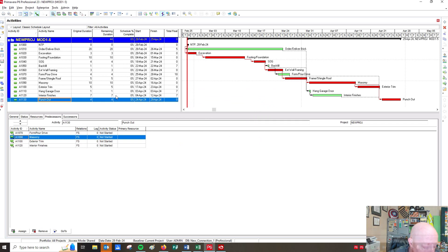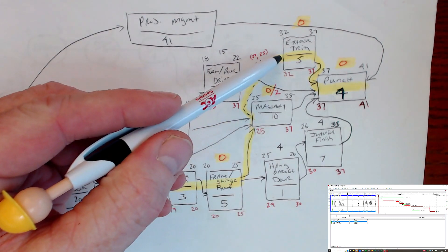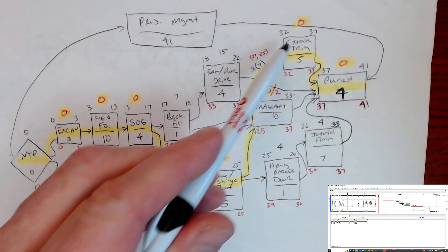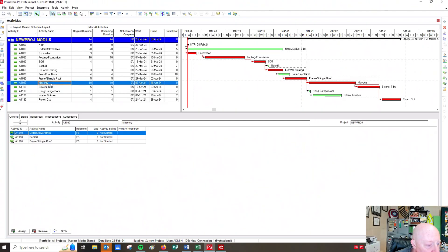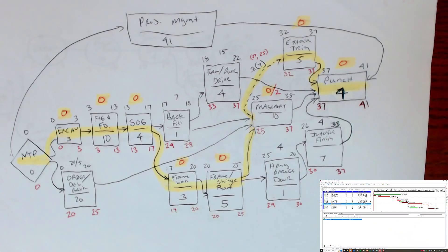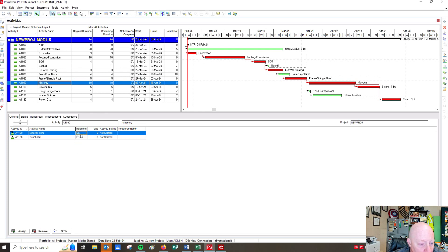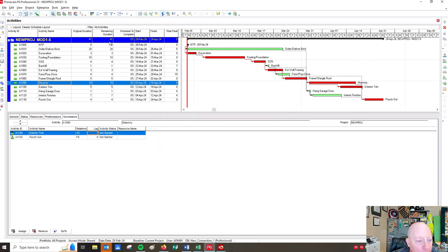The only other problem is probably the start-to-start relationship. Looking at my drawing, I've got a start-to-start coming out of masonry into exterior trim with a seven-day lag. So masonry to exterior trim — let's look at the successors coming out of masonry. I've got punch out but I don't have exterior trim with start-to-start. I'm going to find the exterior trim relationship, change it to start-to-start, and set a seven-day lag. I'll click off on the white part of the screen, then hit schedule and voila — now I have 41 days.